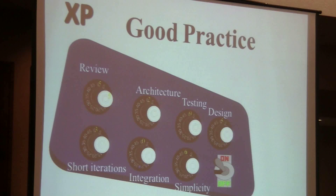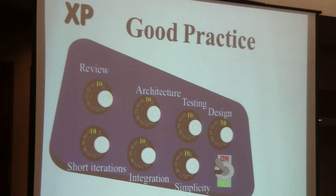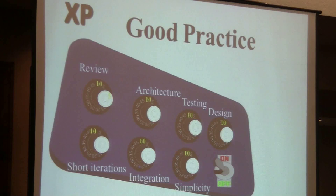Good practice includes all of these: review, architecture, testing, design, short iterations, integration, and simplicity. We sort of always adjust these things, but with XP, you turn everyone up to full volume — you really work through the architecture, the testing, etc., at full capacity all the time. Because when you're doing short iterations, you can do that. With a big project you have to defer: I'll do the review later, I'll do testing later, the design was done up front.